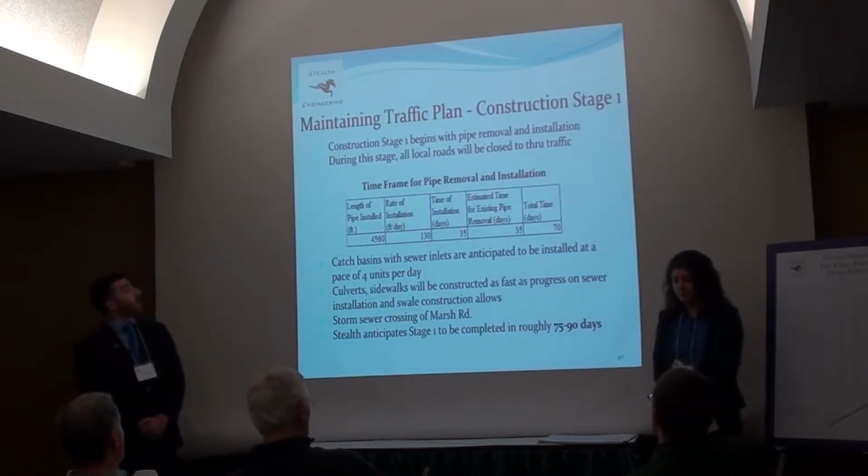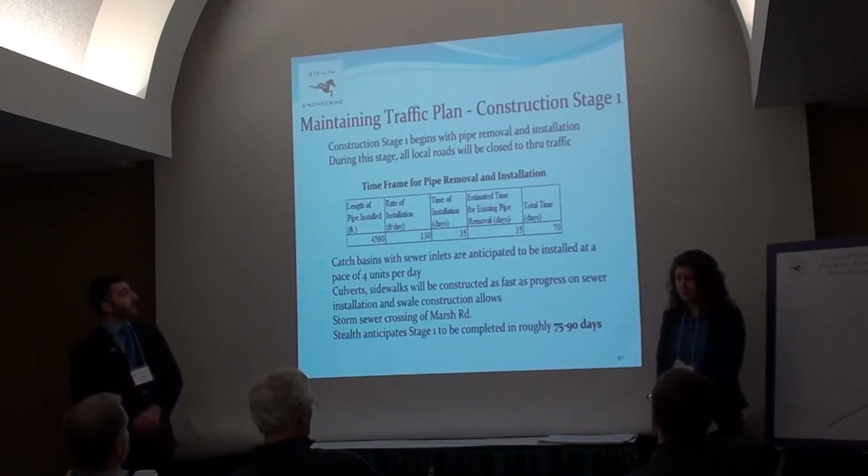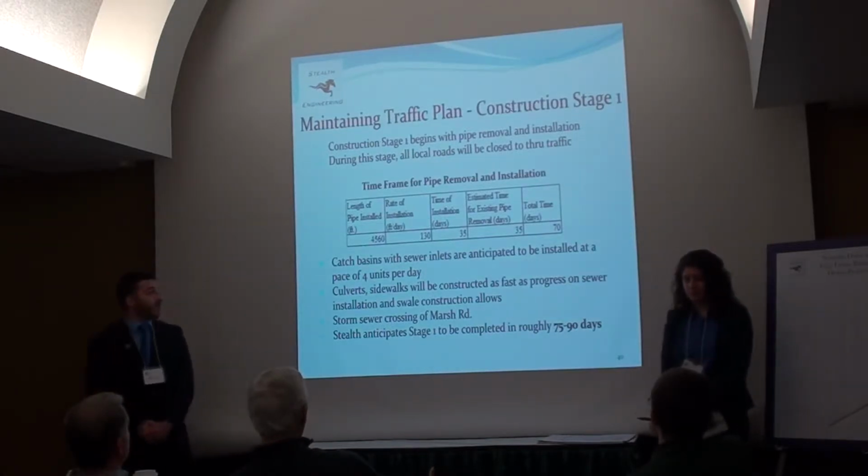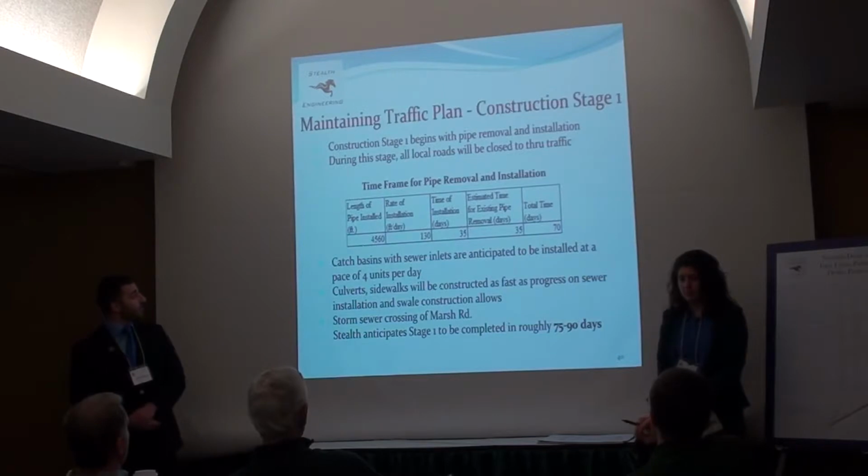As stated, construction will be broken up into stages. Stage 1 will begin with pipe removal and installation. And during this stage, all of the local roads will be closed to through traffic, yet open to neighborhood traffic. It will be the primary focus of the engineers on site to ensure that during this phase, all residents are kept safe.